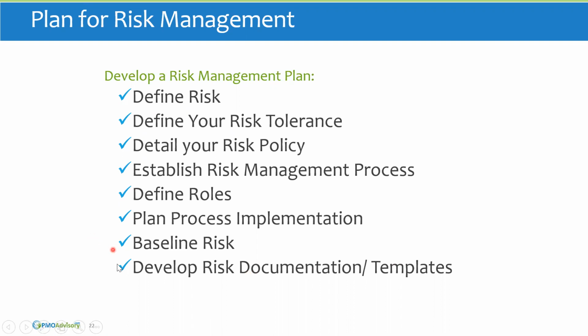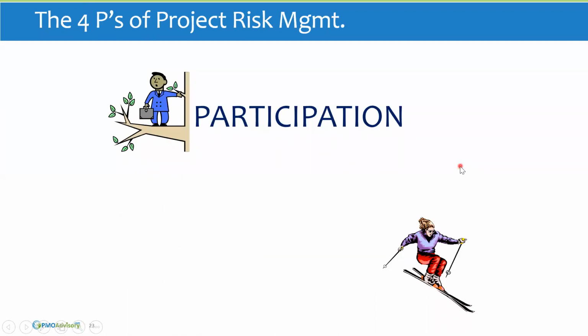You could baseline them, but you don't want to store and update all of your project risks here because it'll be changing daily as you go throughout the project, at least weekly, even if you don't change them daily. So you want to update that in the risk register, which is a project document that resides outside of your risk management plan. Okay, so next are 4 Ps.